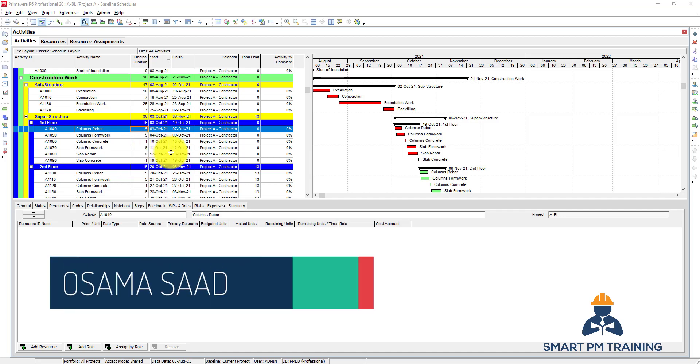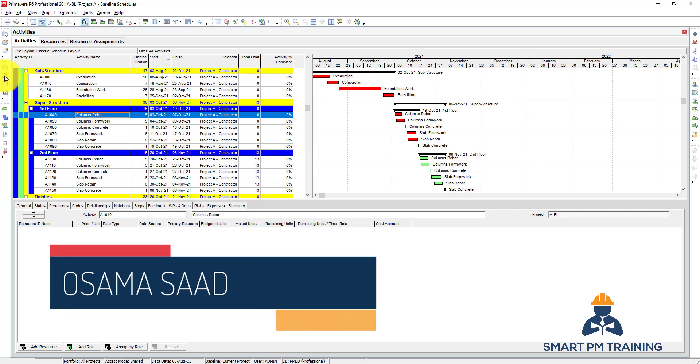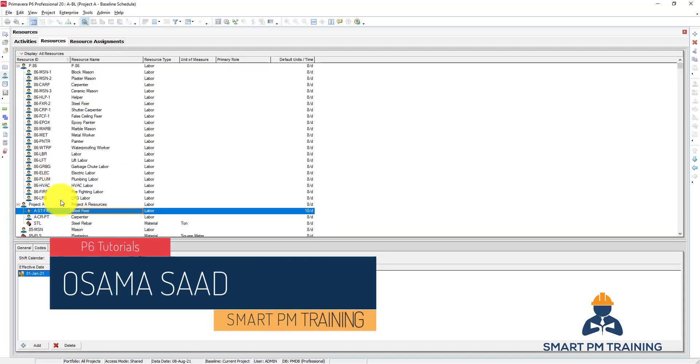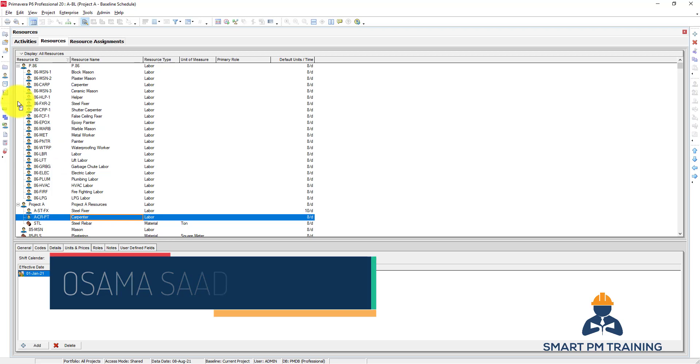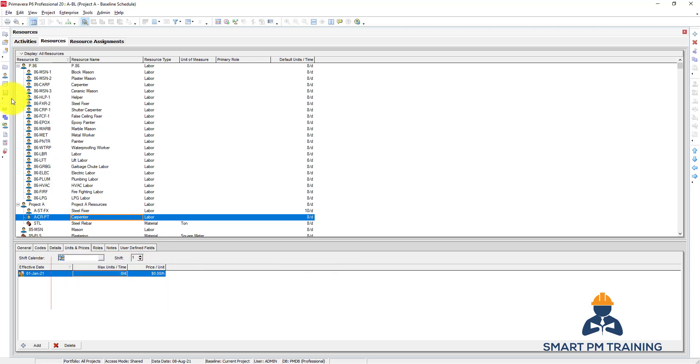Now let's assign resources. You go to resource - we added already the carpenter here, so we'll just go ahead and assign both steel fixer and the carpenters.